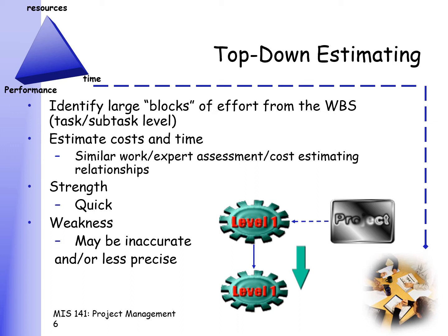And out of that 3 months, 1 month is going to be set for thinking of the theme. Another month would be trying to lay out the groundwork, and the third month will be really for all of the details that are needed, mainly reservation of rooms and so on and so forth. Okay, so if you have had previous experience about a particular task or activity, or even a project, then you can do top-down estimation. Now, the opposite of top-down estimation.